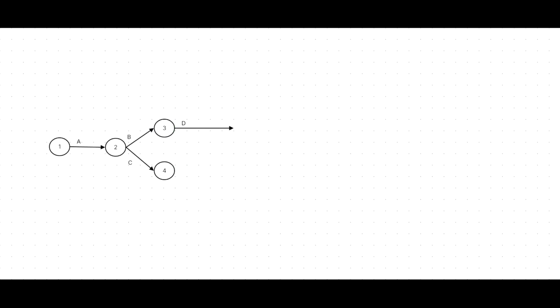Here the D, here E. Now we can name E. I draw the E at the end of the D because for the F we should complete D and E both. Then take another event. Number 5 represents complete D and E.